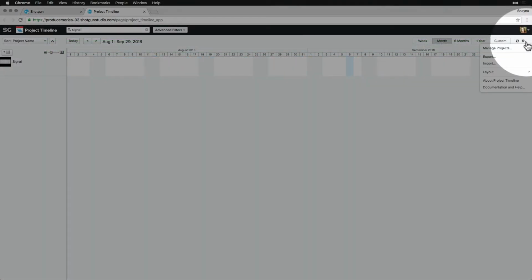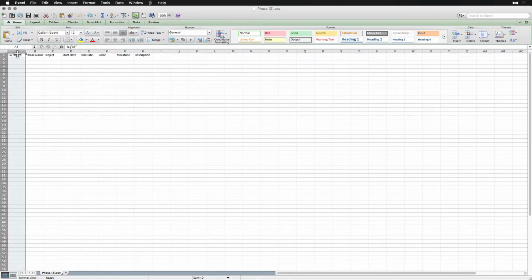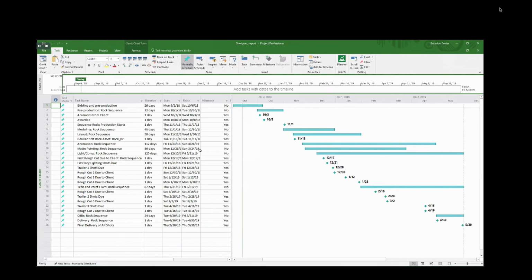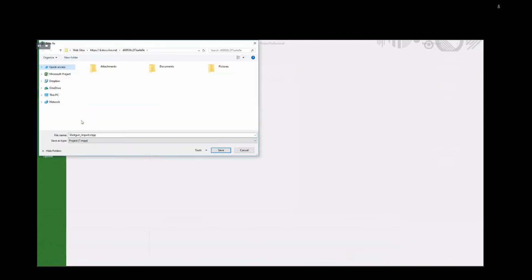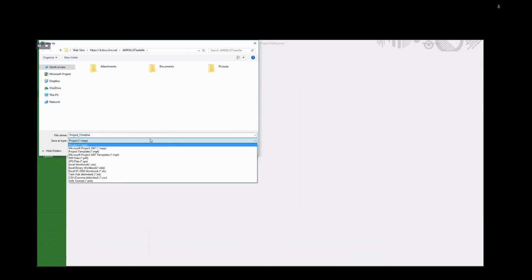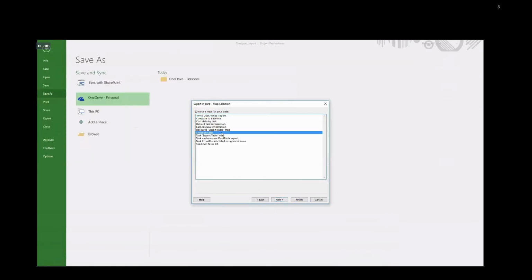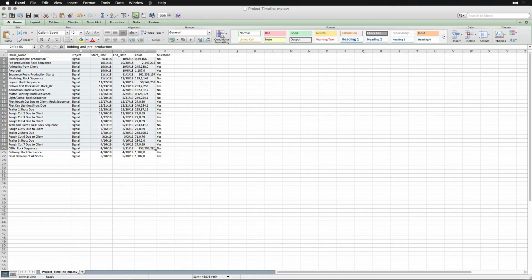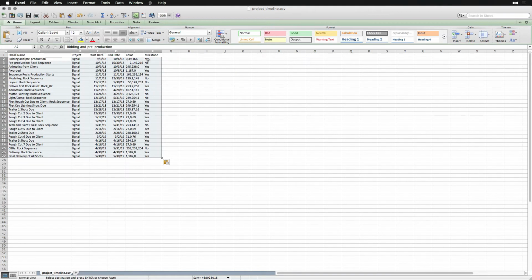First, from Project Timeline, let's export to CSV, even if it's a blank canvas. This will help us map our fields correctly so that the import goes smoothly. We set it aside and open our Signal project in Microsoft Project. We follow the steps to export, and voila! A CSV file will be created in the location we specified. We open that file and copy and paste the column data into the CSV we previously set aside from Shotgun.